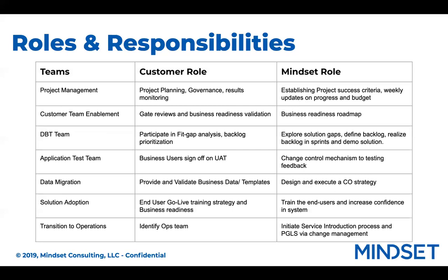So PGLS is an acronym for post-go-live support. And a little bit of storytelling here. When we went live with this project, the post-go-live was for 6 weeks. And we had established certain yardsticks and metrics, and we came way below that. We were able to show that the total incident count and everything was way less. So that is how we were able to make an early exit. And on projects of this scale, usually that doesn't happen. So thanks for that question, Peter.